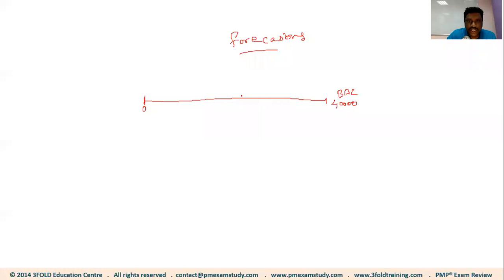So somewhere logically, I'll draw a line here, and I will write my earned value is 25,000. That's the work which I completed. How much work is remaining? Very simple, right? 40,000 minus 25,000, 15,000 is the work remaining. So BAC minus EV equals 15,000. That's the work remaining. So 25 plus 15 constitutes your total project budget, BAC.